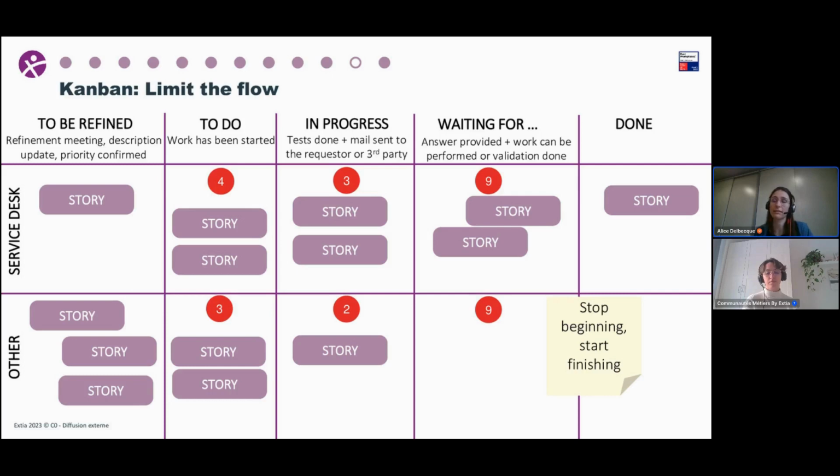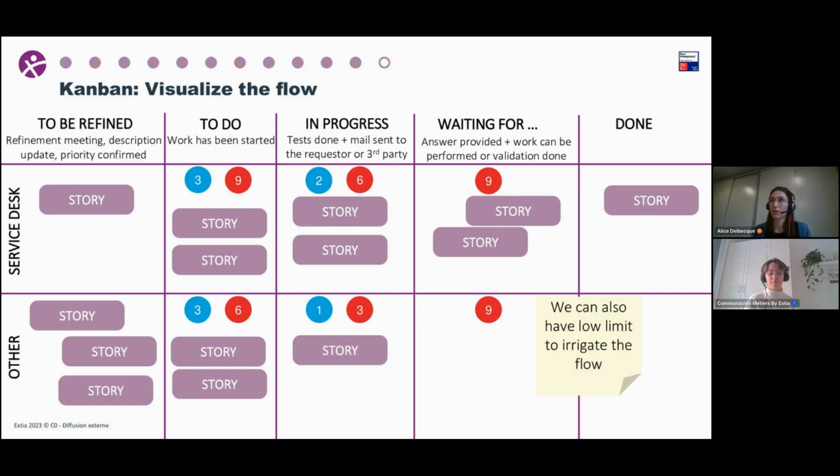And when I say that it's just 3 principles, it means that in Kanban, you have no defined meetings as in Scrum, where you have sprint planning, daily stand-up, etc. You don't have defined roles, you don't have a product owner, you don't have a Scrum master. You just have to respect the 3 principles, and then it means that you are doing Kanban. However, if you want to have a daily, or if you want to have a product owner in Kanban, yes, you can, of course. It's just that it's optional. If you don't need it, that's okay, and you can live without.